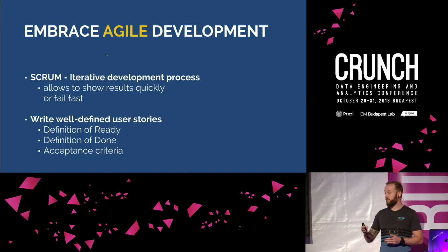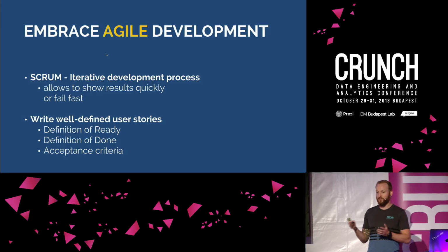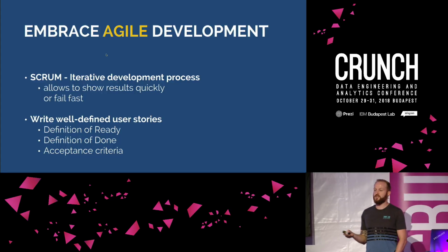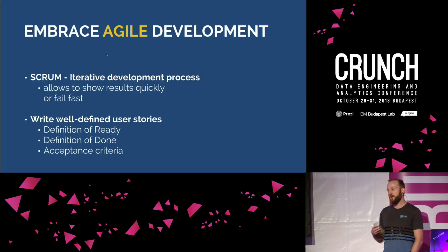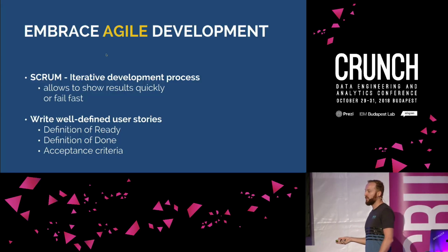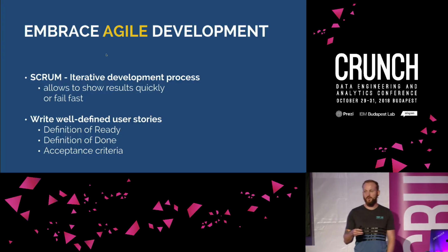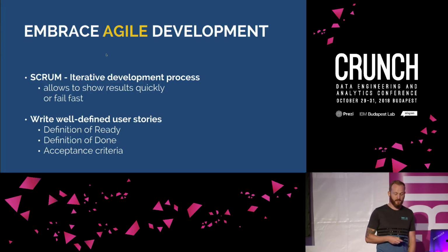They just say, I want this, I want that, but not with a detailed description. So in the sprints, data scientists had to sit down with the stakeholders and clarify what they actually wanted, and by the end of the sprint they maybe had a rough idea, but they definitely had not yet produced the results that they were asked for. So stories got taken on into the next sprint.